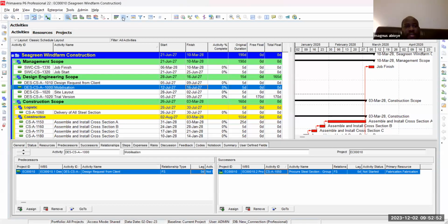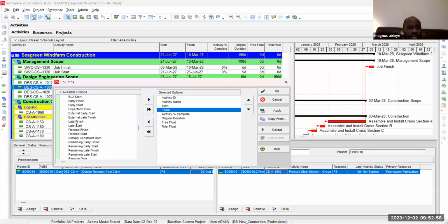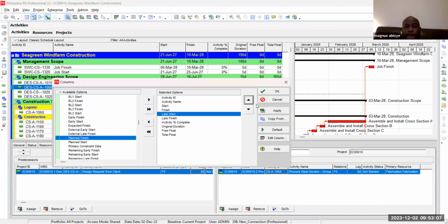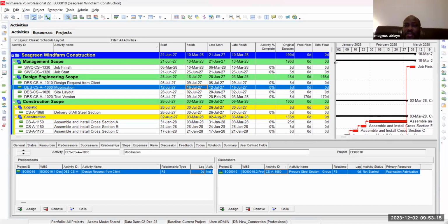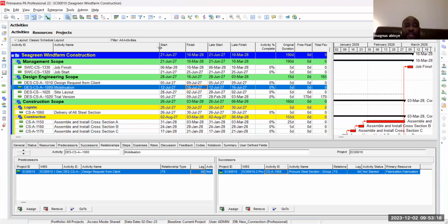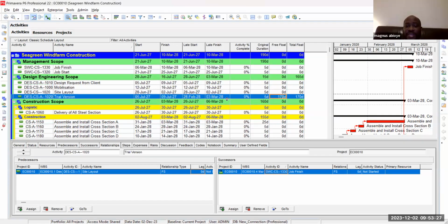Now let's look at that. This is early start. I'm going to late start, late finish. So a free float tells you how late another activity would start or finish before it starts affecting the other dates. Now look at this, a free float of 170 days. And let me look at the reason why. Okay, it goes from July and goes straight to the finish date.